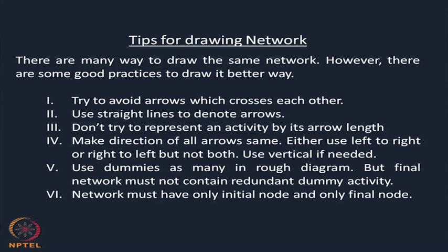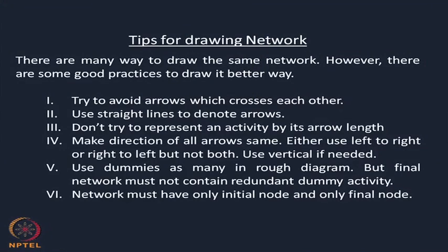Number 4, make the direction of all arrows the same, whether it is left to right or right to left, make it only in one direction. Use dummies as many as you want in the rough diagram, but the final network must not contain redundant dummy activity. Be rest assured that you should not use any redundant dummy activity in your final network diagram, because the costing will be much more. So, you have to note this one.